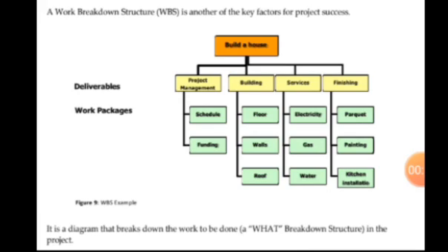This WBS helps break down the project into different deliverables or phases, thereby making your project easy and easily controlled. Now, this is a framework for a WBS for building a house. You have the deliverables, where you have the project management, the building, the services, and then finishing. Then you have the work packages, which covers many other items.